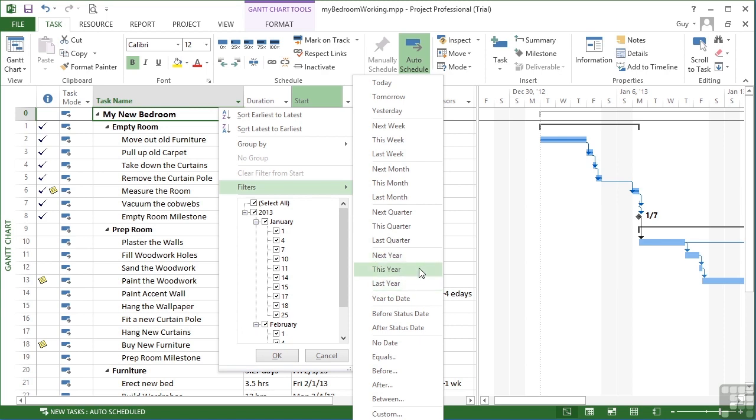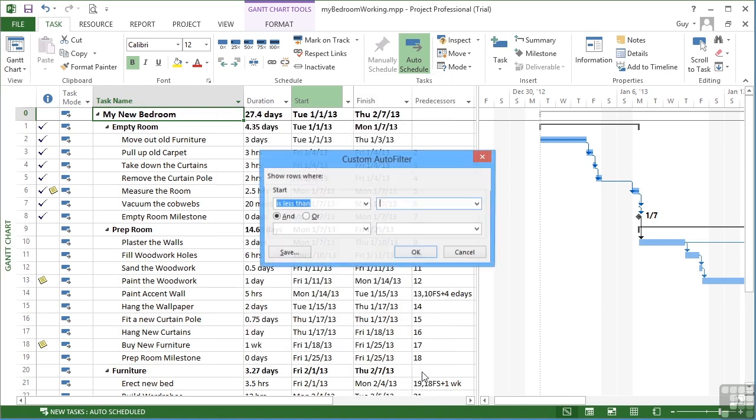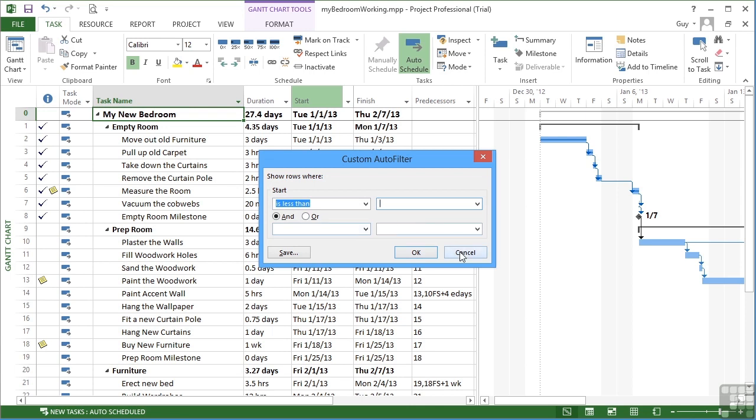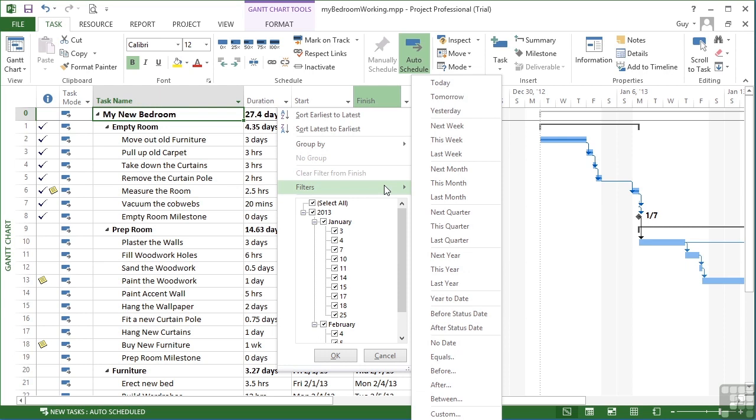Using the working files you may find that you need to change either the project start date or the project current date which we cover in a future lesson for any of these filters to actually work such as next week, this week, last week. So very much built in allowing you the ability to filter out by segments of time. We also have year to date, so everything up to today. This is in the start column. Anything before the status date or after the status date, that was an arbitrary value set in the project information. No date at all, so it hasn't been set at all. And then your normal equals before, after and between that take you to the same little dialog box. You'll find the finish has the same built in options because it's still a date column. So we still have that ability to filter by the finish date or the planned finish date.